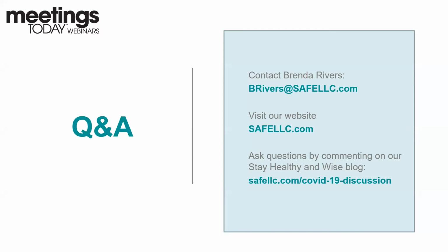deposits back. I mean, hotels are going to have to be taking contracts like this, and because it is going to turn, and you will be able to continue with an event in August, but we don't know that yet. I mean, the country, as you all know, we haven't even hit our curve. Yeah. We're still gaining. So every 2 weeks, that's the other thing for you to create a chart, create a monitoring system. What are the primary things that you must monitor and track?